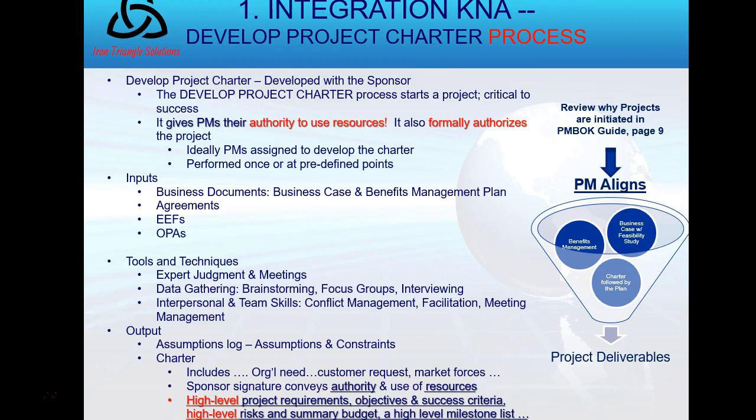The next input are agreements, which go by many terms. Sometimes they're called contracts. Sometimes they're called memorandums of understanding or MOUs. SLAs or service level agreements is another item here. A service level agreement is when two organizations are going to provide each other service. It discusses what's my response time. If I call you, you must respond within 8 hours. You must fix my problem within 12. It's about service between organizations. Also goes by a letter of intent or a letter of agreement, those sort of things.